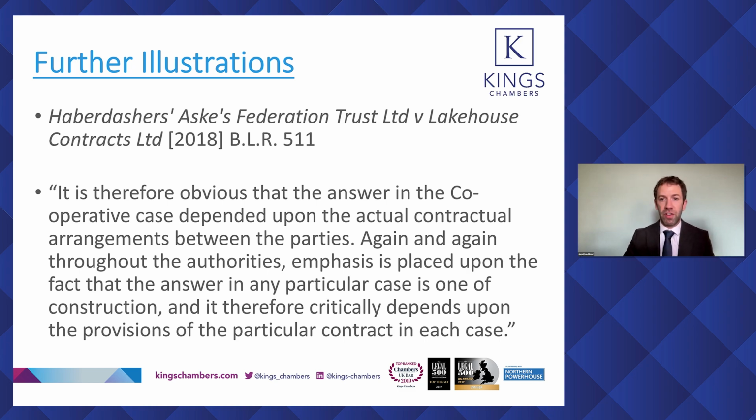So it's always worth checking, even if there doesn't seem to be a policy or if no claim has been made on a policy, it's worth checking what the underlying contract says about insurance, because it might well give a defence or prevent a claim against the other party to the construction contract.